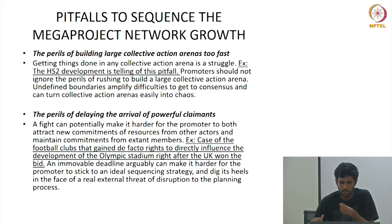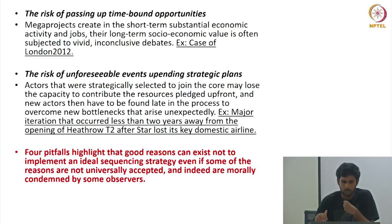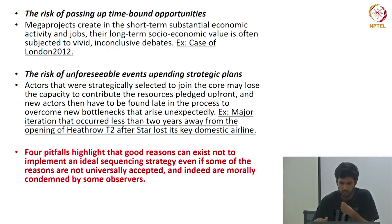The pitfalls in sequencing mega project network growth include: the perils of building large collective action arenas too fast — the HS2 development is an example of this pitfall; the perils of delaying the arrival of powerful claimants — the case of a football club that gained de facto rights to directly influence the development of the Olympic stadium right after the UK won the bid; the risk of passing up time-bound opportunities, as seen in London 2012; and the case of unforeseeable events upending strategic plans — the major disruption that occurred less than two years from the opening of Heathrow T2 after Star Alliance lost its key domestic airline.